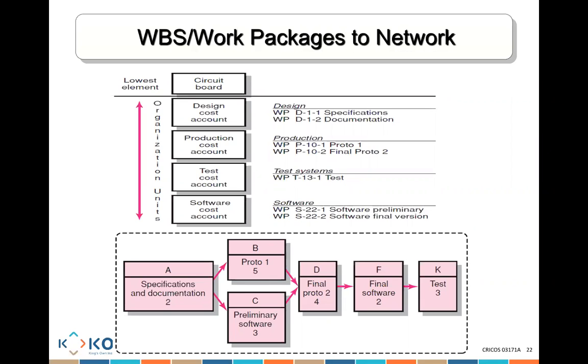Now that's awesome, but something is missing. You need to ask yourself, okay, I know all of these tasks that I need to do, but what should I do first? What should I do after? I cannot test first, then create the prototype. I have to create the prototype first, then start doing the testing at the end. So you need to know not simply the activities or the work packages you need to do, but also when you need to do them.